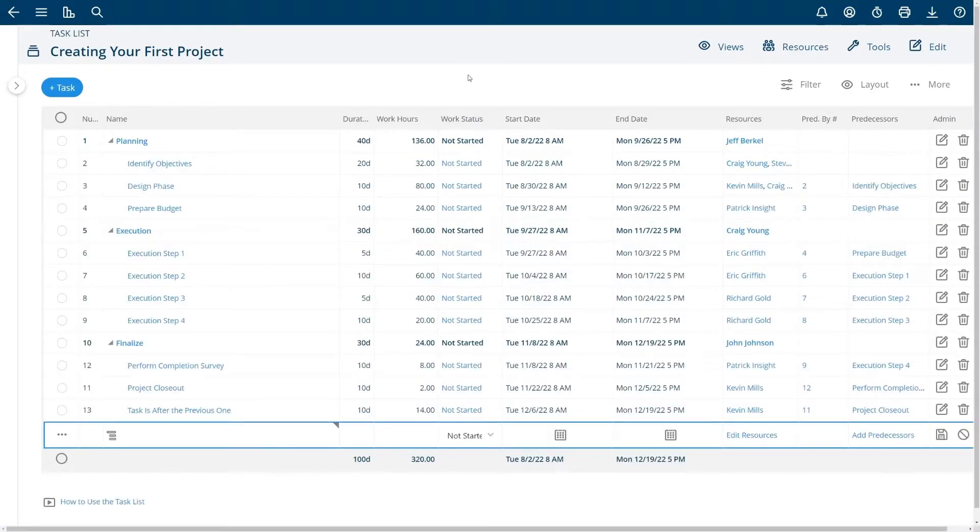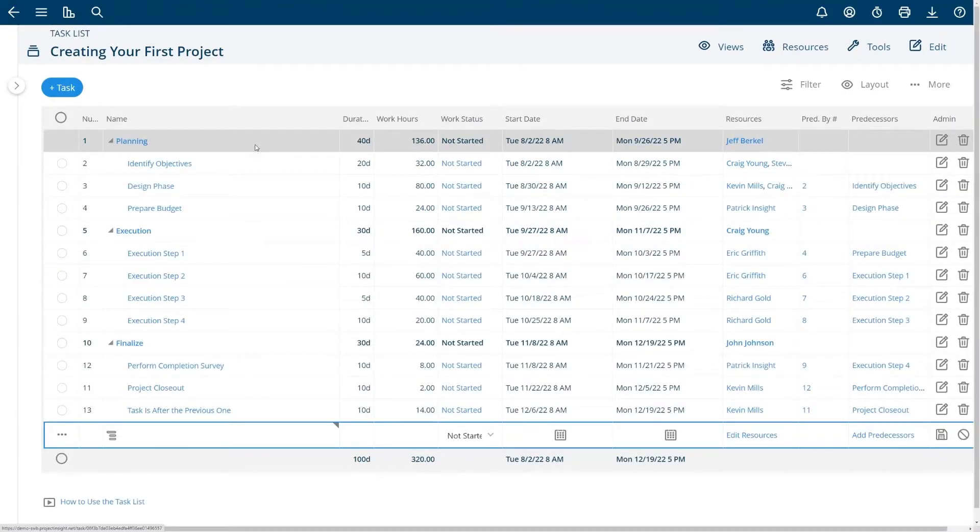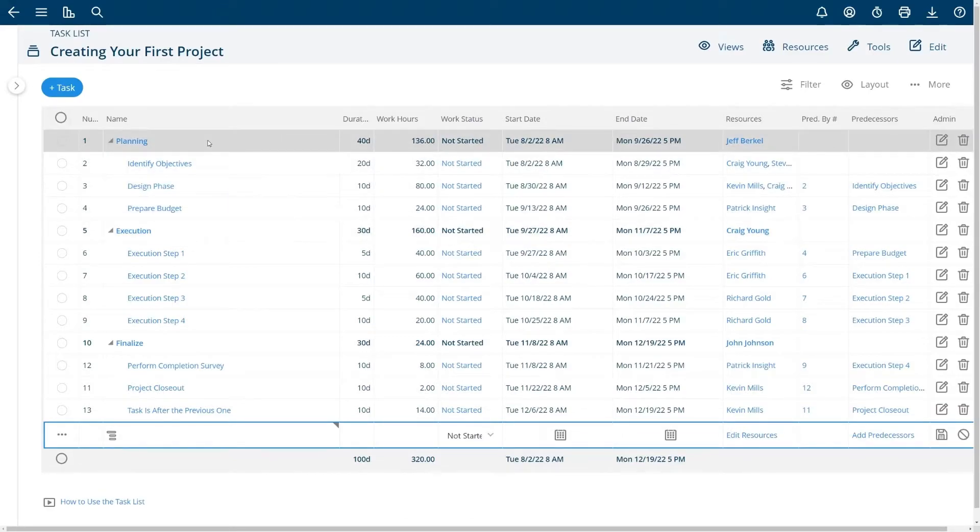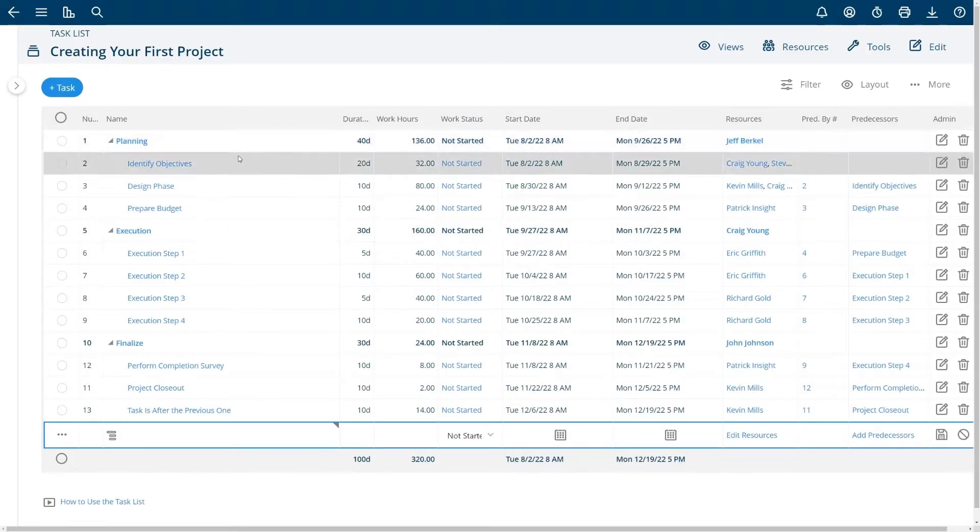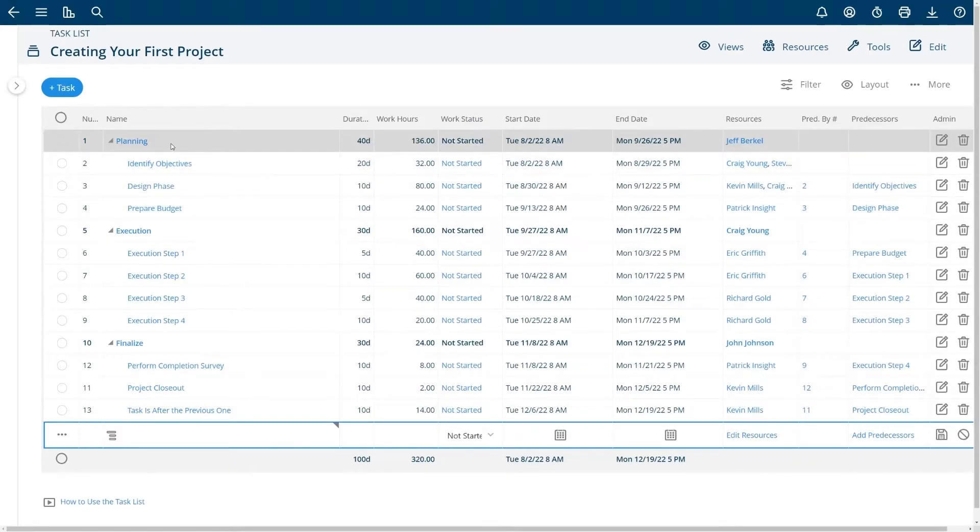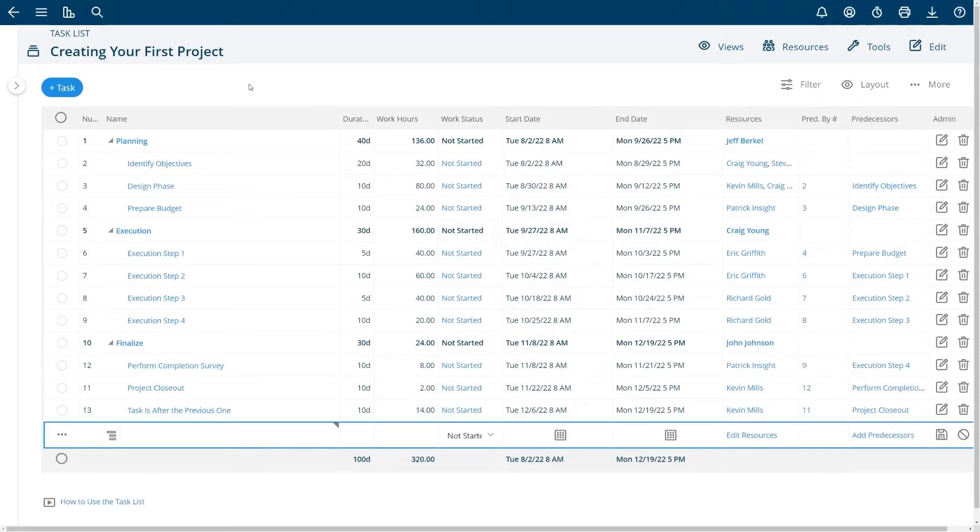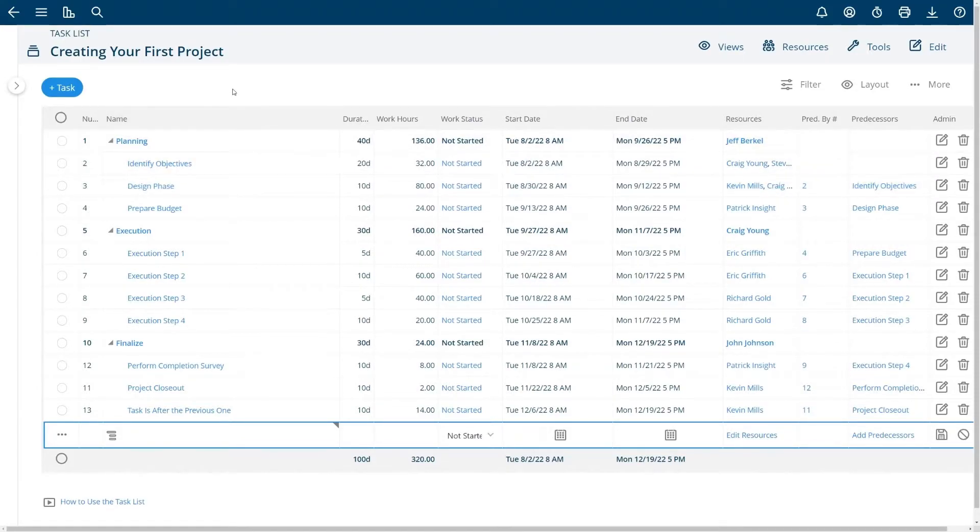So here I'm going to talk a little bit about the task list. These bold tasks are summary tasks. That means that they're calculated based on the sum of their children tasks. You can have as many summary tasks as you want. You can have as many levels of summary tasks as you would like. The amount of summary tasks and how you set it up is up to you.